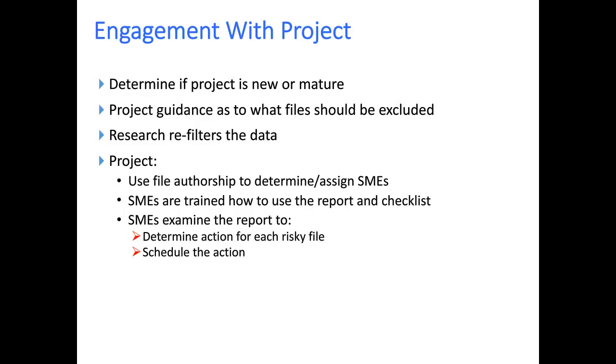Once we have these SMEs, we reach out and suggest the project. Obviously, some of them are perhaps on critical projects or critical tasks, and managers sometimes have the ability to select a specific SME that is perhaps not super busy on some critical task for us to train and work on this process. So once the SMEs are selected and finalized and vetted by the managers, they examine the report that we provided and determine an action for each risky file. The next step would be to actually schedule that action and put that into project plans.